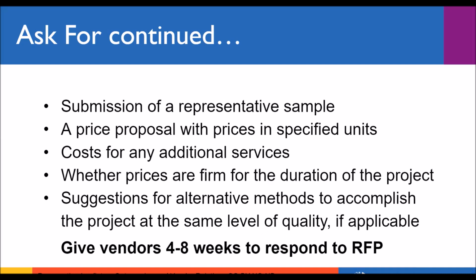You'll also want them to include whether any sort of additional services, what those costs are. And those might be things that you may or may not use, but you would want to know what the cost would be ahead of time. So is this storage or delivery or shipping or anything like that? You would want them to list whatever additional charges there might be, even if you don't end up using them. And then also whether or not the prices are firm for the duration of the project.